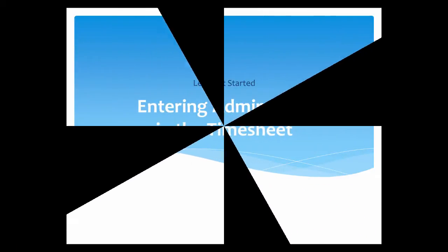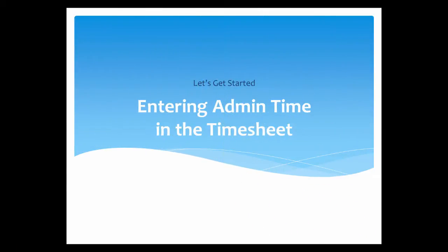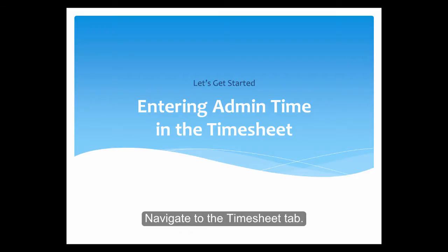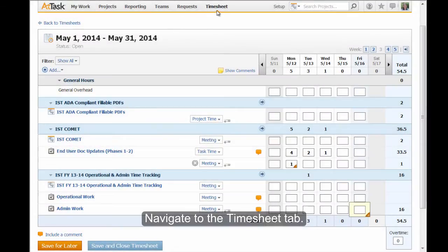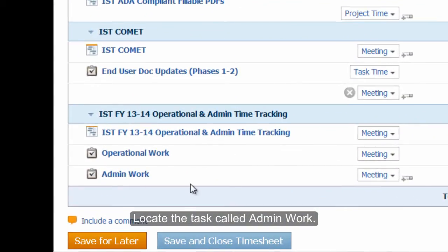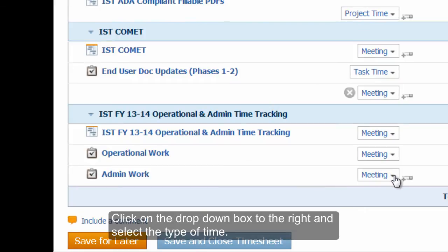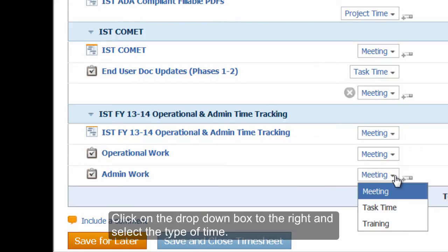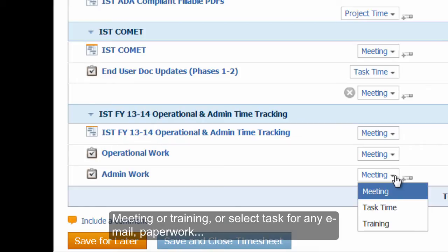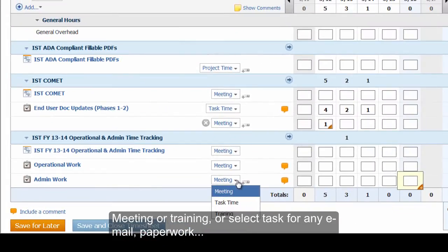Let's get started by entering admin time in the timesheet. Navigate to the Timesheet tab and locate the task called Admin Work. Click on the drop-down box to the right and select the type of time — Meeting or Training — or select Task for any email or paperwork.